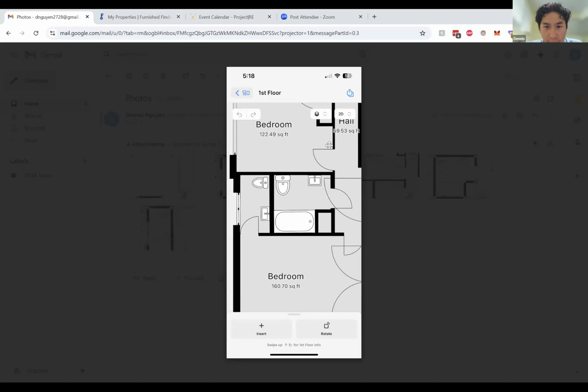Oh, I see. Okay. And it won't cost very much because it's the frame walls, nothing's really moved. It's one frame wall. The plumbing's all right here. They could slop a shower pan right in, and then your closet space comes down. Your bedroom's gonna get a little small, but it's already kind of small. And I would rather have a little bit better primary and a little bit smaller bedroom off that.